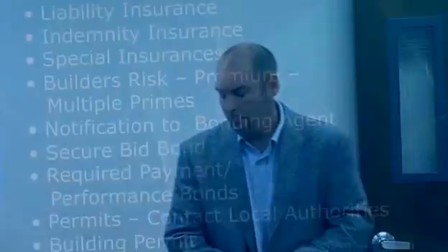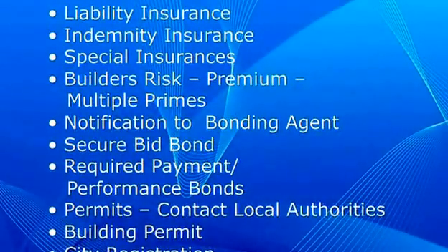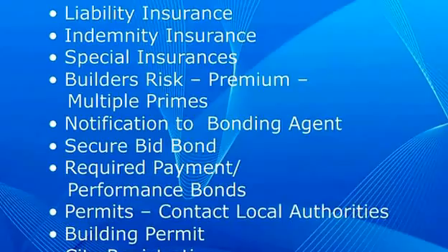Okay? You need to know very simply payment and performance bonds. A payment bond is just a guarantee that you as a general contractor will make sure you're guaranteeing to the owner that you are going to see to it that every subcontractor, supplier, tradesman, Union Hall is getting paid for the work that they've put into that job, in a nutshell, okay? There is a cost that comes with that.